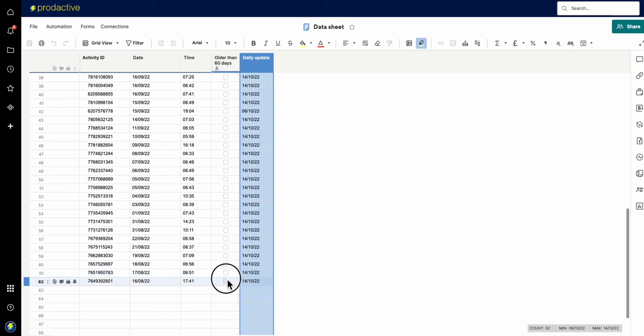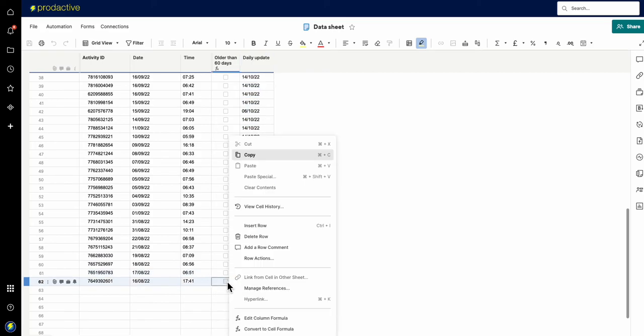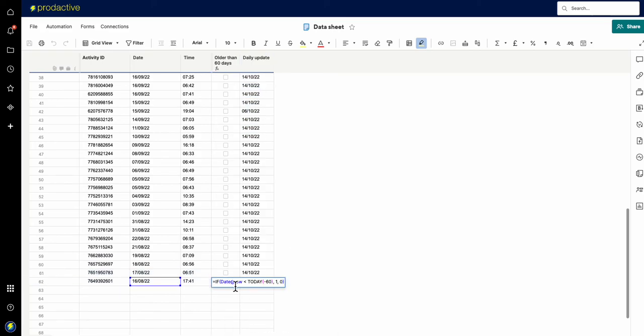And then in this case, I just have a simple formula. And let's just have a look so you can see what is the formula in here. And all it's saying is if the date is greater than 60 days, then tick it.